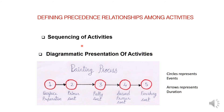While some activities can be done simultaneously — for example, electrification work and plumbing work can be carried out simultaneously, saving time for completion of the project. Also, some activities need a common equipment, so they need to be sequenced on the basis of time or cost analysis. Equipment can be shared by sharing the time, done for minimizing cost. Or if we have adequate budget but less time, the equipment can be hired independently. In this way we can sequence the activities.